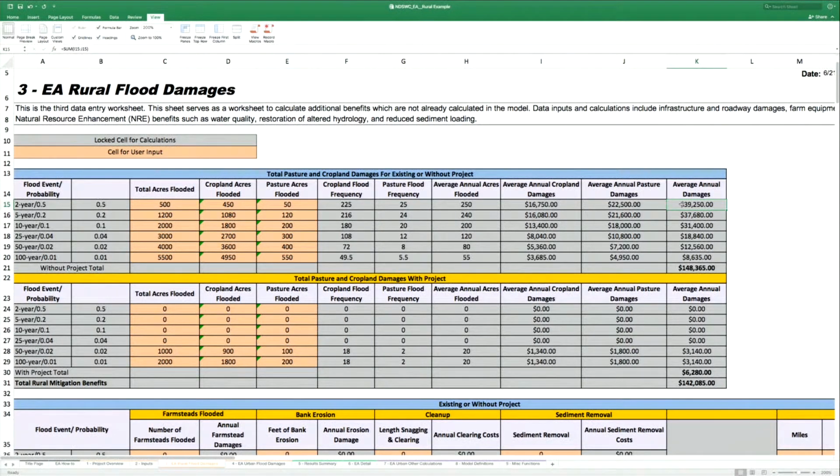think about an economic framework, we have to incorporate the probability of that event occurring. So the way we do flood damage analysis is to look at the full range of floods, say for example, a 2 through 100 year. We calculate each of the damages for each of those events, and then we weight each of those events by the probability and sum that area under the curve, or sum all of those damages, and that gets us the total damage across the range of those events that we call average annual.